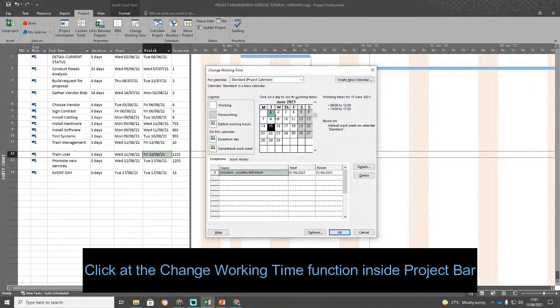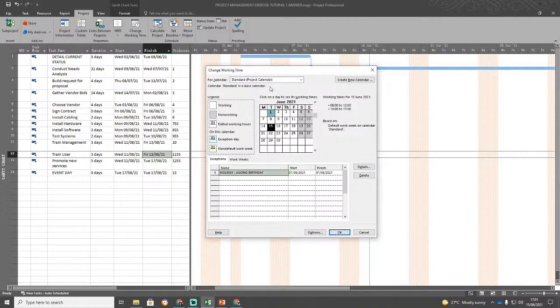Basically, I just use the default setting of the calendar, and you still remember that we have a holiday on the 1st June. I have to set this as a non-working day, meaning that the people are exempt from working. So we have to use these exemptions.